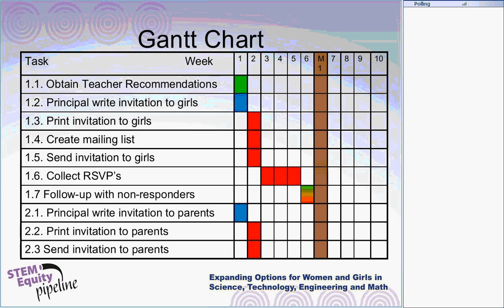And those of you who've done any grant writing have probably done Gantt charts or timelines many times. But for our activity, here's that same list of tasks, just repeated here. And some of you may be thinking, oh, I could do this in Excel. You could. It's very simple. And what I've done here is you'll notice that these are in different colors because these green represent someone, blue represents someone, red, you remember red was Henry back there in that evaluation plan. And so in this Gantt chart, we've got 3 people that are working on these specific tasks.